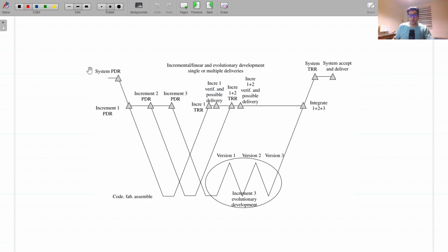IIDs may also be plan driven in nature when the requirements are known early in the life cycle, but the development of the functionality is performed incrementally to allow for the latest technology insertion or potential changes in needs or requirements.